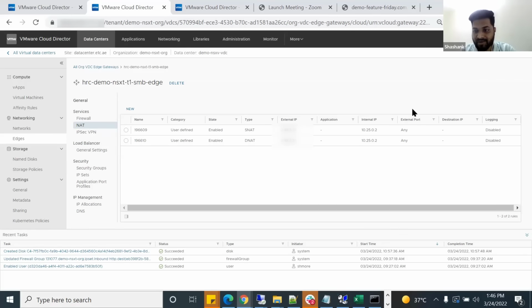So let's say on the 5th we have this migration scheduled at 3 p.m. We'll be doing this 2 days before, because for this I don't have any dependency. There won't be exactly. It gives you time to troubleshoot it as well. Yes, because at the top network layer I didn't do any routing, so traffic is still going to NSX-V. Until and unless I do a failover in that route, I will change the route. There will be a disturbance in the traffic. So that's what we do.